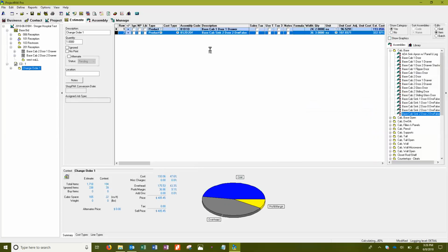All right, so you can see we're dragging all those things in. Like I mentioned before, you can always increase them, decrease them. If for some reason this was a deduct, you might right-click on reception 06 and copy it down into the change order, because that's what they're deducting, and then just change what you're giving back. You're not going to give back all of it, maybe. Does that make sense?